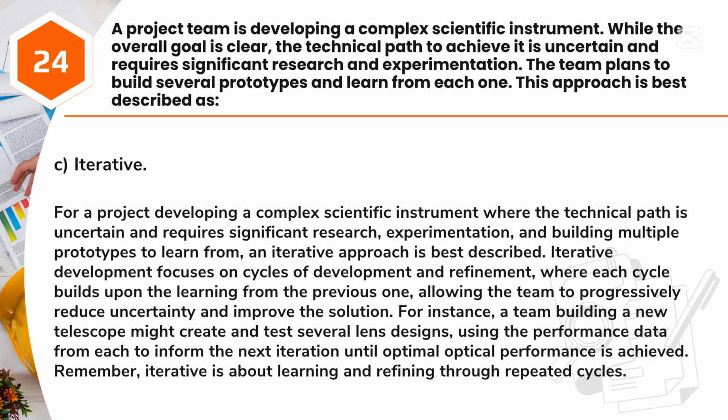Answer: C. Iterative. For a project developing a complex scientific instrument where the technical path is uncertain and requires significant research, experimentation, and building multiple prototypes to learn from, an iterative approach is best described. Iterative development focuses on cycles of development and refinement, where each cycle builds upon the learning from the previous one, allowing the team to progressively reduce uncertainty and improve the solution.